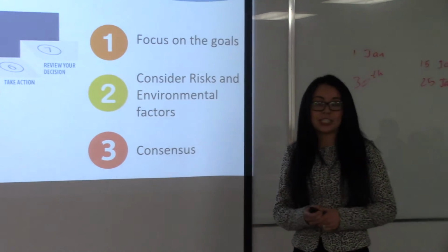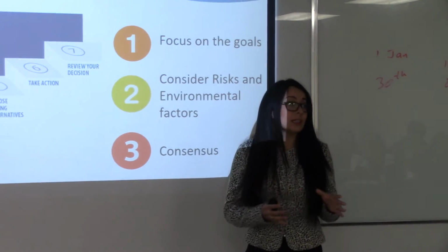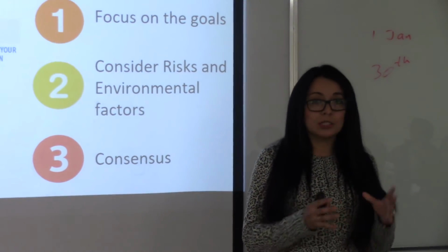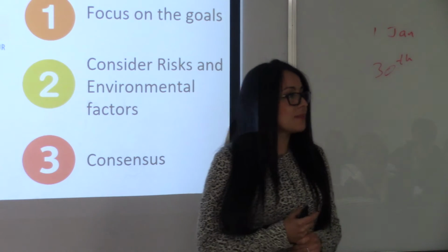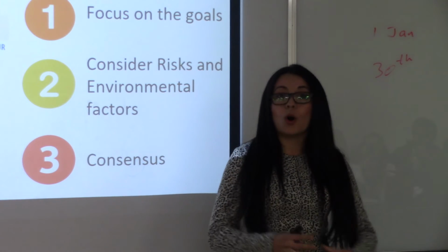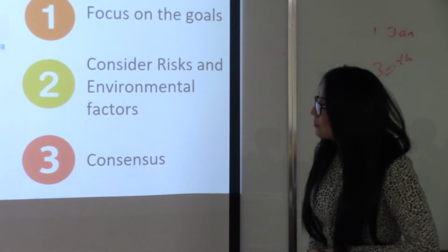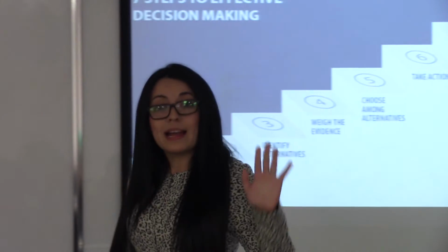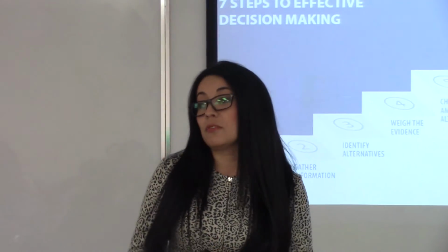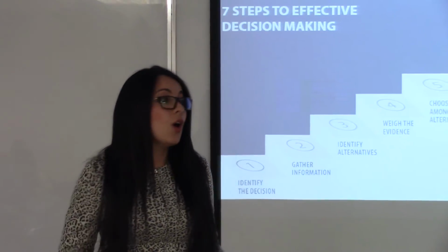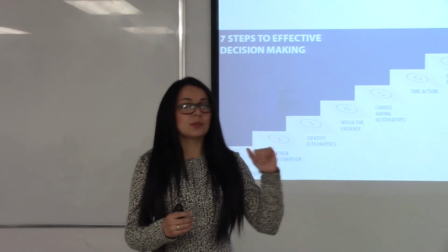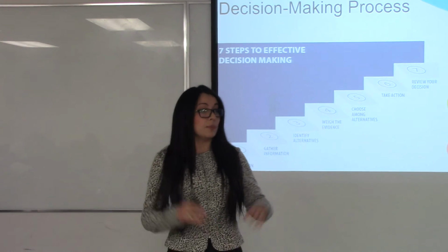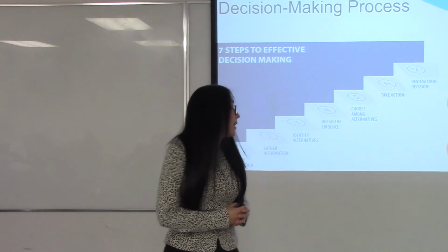Then we gather information. How many activities do we have on the critical path for the next round? How many available resources do we have in the pool? This information was important for us because we can predict how many resources other groups will assign to their activities. Then we identify alternatives. What if we assign only one high-skill resource to the activity? What if we assign 2 high-skill resources? What if we assign 1 high-skill resource along with 1 average skill resource? What if we take resources from different categories and we assign both together?